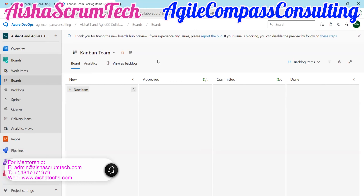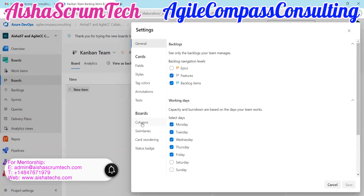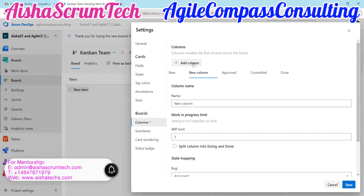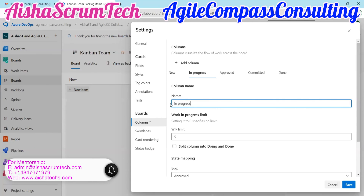So let's customize our boards to work for us. I'll go to Settings, then Columns. The first option is Column, and the next thing is Add Column. Whenever you add a column, you can go ahead and edit the name. Let's say we want to have 'In Progress.' This is where you set your WIP limits. I always want to set my WIP limits based on the number of team members I have.